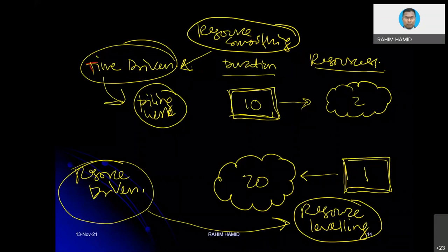So when we want to change the arrangement of activity, this is when we are going to utilize the activity total float or free float if they are available. But if not, then there could be some implication, in that we might prolong certain durations a little bit in order to accommodate the utilization of that limited resource, without us realizing the specific name. In the books, it is already there for many years, maybe 10, 30 years ago, people already talked about this kind of concept. But in reality, that is the thing.